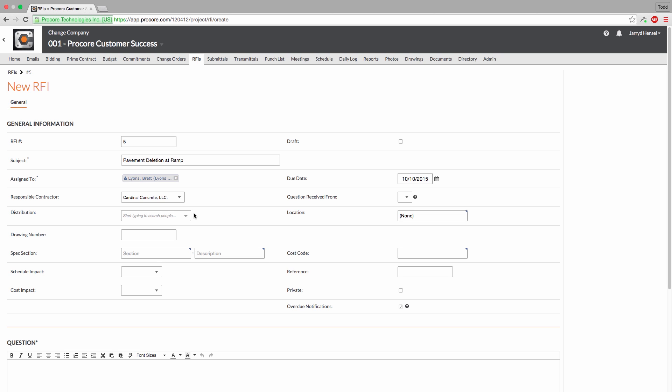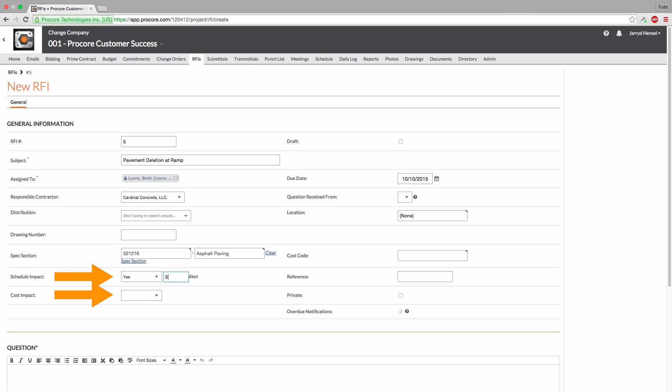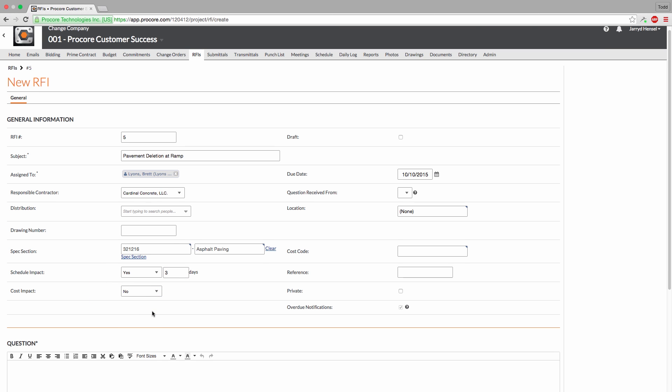You can associate the RFI with a Specs section here. You can even indicate any potential schedule impacts or cost impacts associated with the RFI. You also have the option to mark the RFI as private, which will hide the RFI from everyone except users with an admin permission on the RFI tool, the assignee, and users on the distribution list.